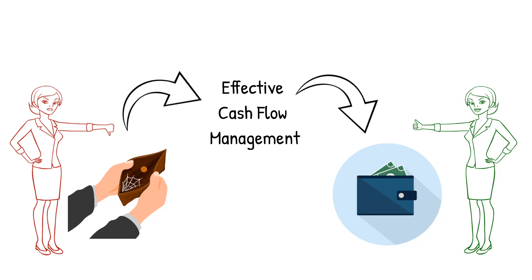You can of course calculate cash flow at different levels within the construction company — on an individual project basis, where the cash flow deals with the income and expense on a particular project, and an overall company cash flow, which deals with the difference between the company's total income and total expenses.